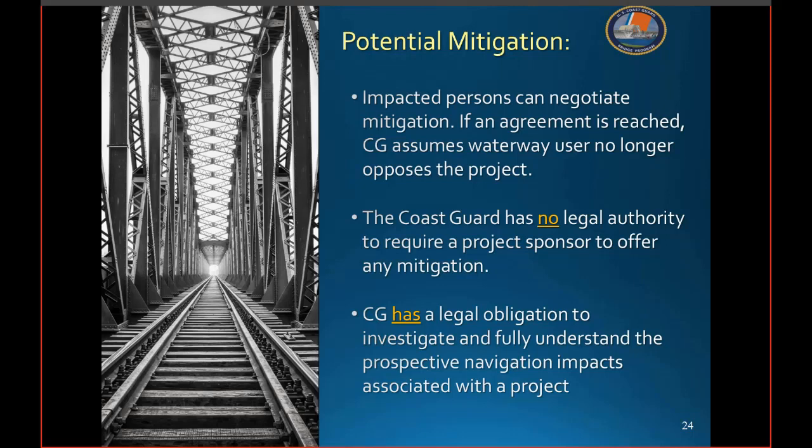So when there are cases where someone's needs are not being met, it is possible that the impacted person can elect to negotiate with the project sponsor or the applicant. They are free to negotiate with you. If the applicant and the impacted entity reach an agreement, the Coast Guard has no opinion about it, but we will then assume that the particular waterway user will no longer oppose the project. With all that said, the Coast Guard has no legal authority to require a project sponsor or applicant to offer any type of mitigation to impacted persons or businesses, but we do have a legal obligation to investigate and fully understand the prospective navigation impacts associated with the project.